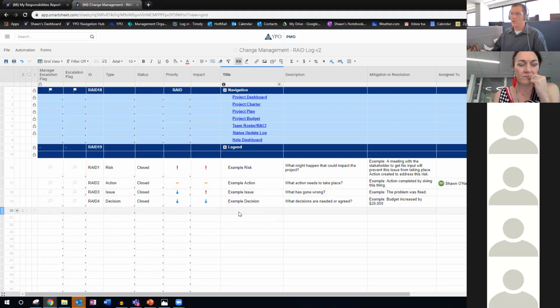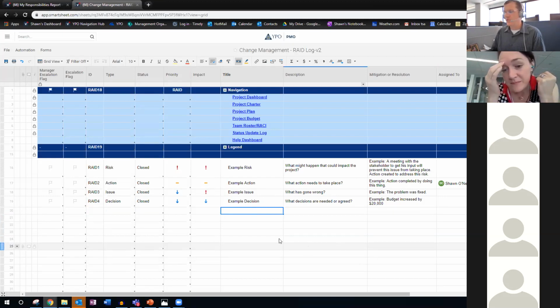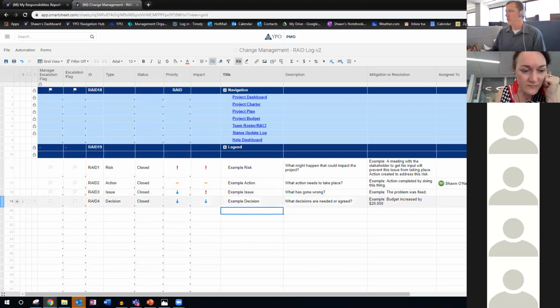So on my project calls, I always keep this log open and record the actions as we go. And then what does stand-up agenda mean if you click that box? Oh, okay. So sometimes when you're on a call, these don't get reported anywhere, but essentially when I have a project that's got 20 or 30 action items and I want to have a call that just covers certain items, I may check those so that during the call I only cover the items that I've checked. So it's just like a check agenda item for a particular call.